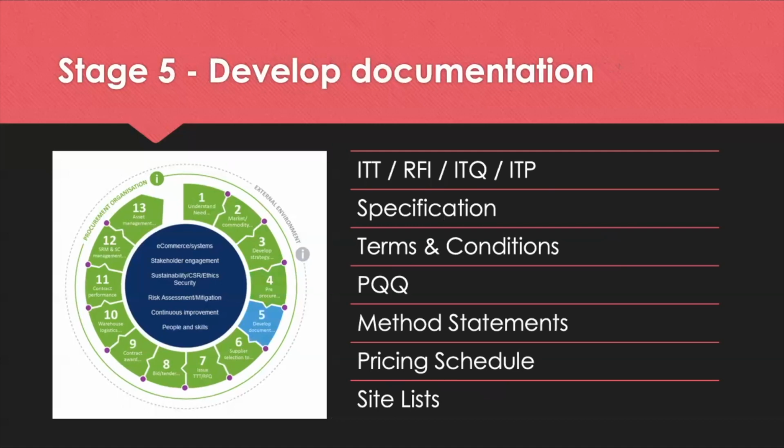So stage 5 looks at developing documentation, and the time you spend developing documents obviously depends on the size of the contract. If it's something really simple, like a quick quote, you're not going to spend too much time developing documents, but for a multi-year, large-scale £1 million tender, you would have far more documents to develop because of the risks associated with those larger contracts.